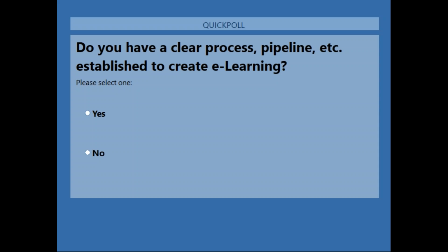Unfortunately, I've been in the case where stuff happens and re-edits need to happen. I don't want to say this out loud, but sometimes I've had to say, okay, look, I'm going to take one for the team, I'm not going to charge for this. But I definitely learned my lesson the hard way, by not getting paid for my time, to make sure I have those hard conversations with my clients before we do that the next time. So that's a great question, and I wish I had a ready answer, but I don't. It's just something you need to plan for and either learn your lesson by not getting paid or make sure that you have that clause in whatever contract you sign.